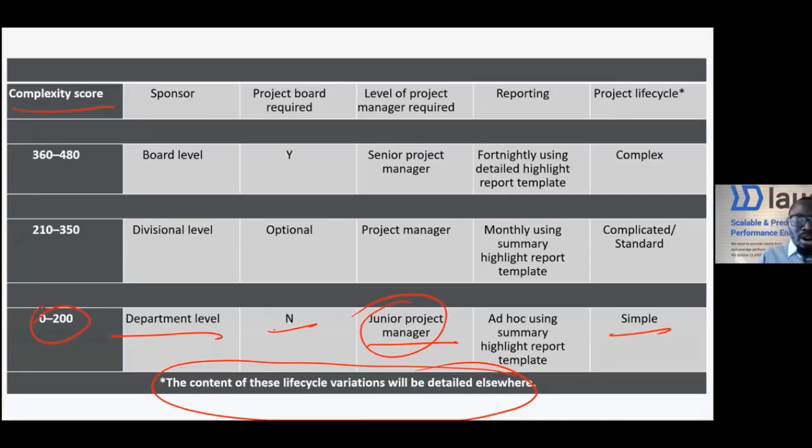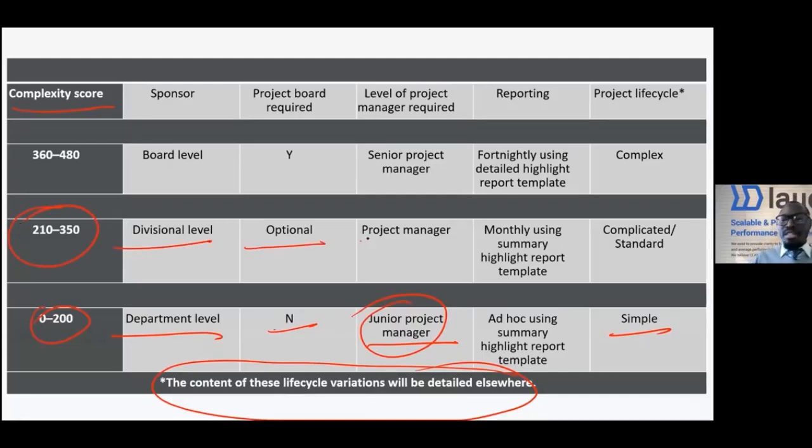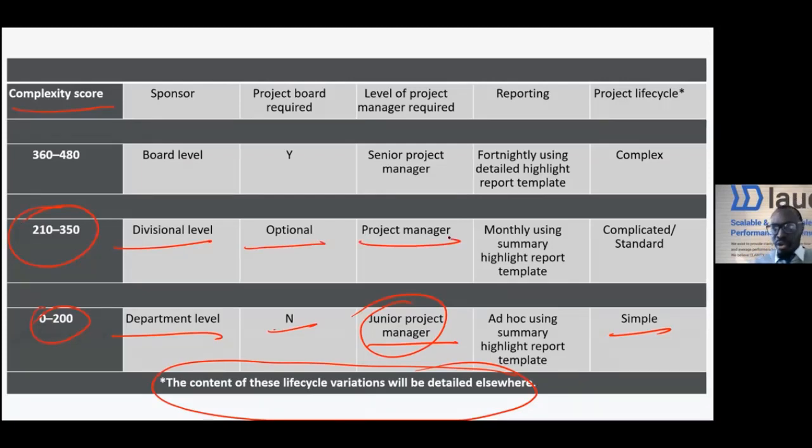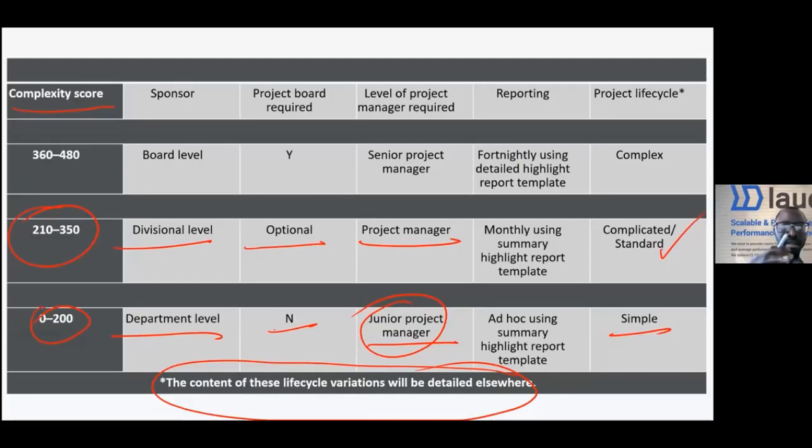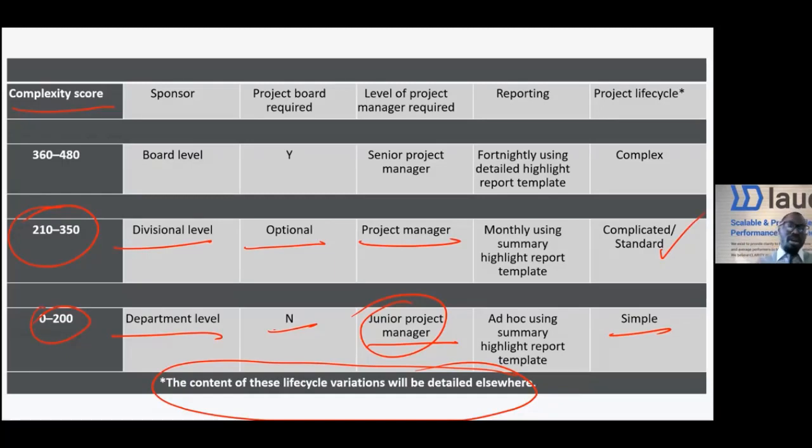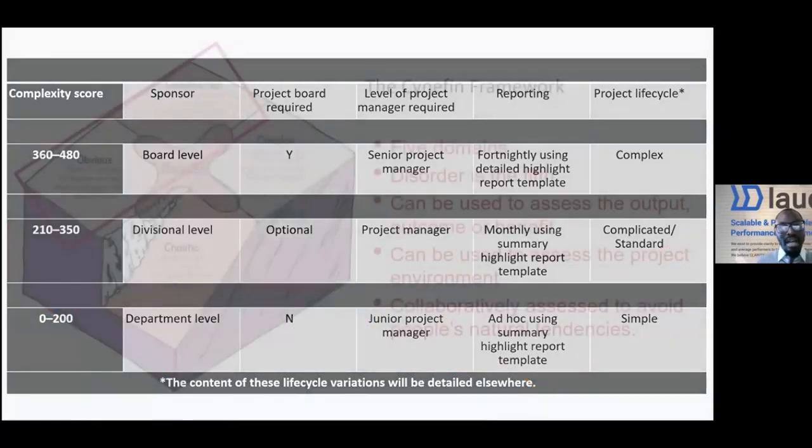But if a project scores 210 to 350, that would be our divisional level. We may require a project steering committee. We need a full project manager, and so on and so forth, because that kind of project is complicated or standard. Organizations normally develop these project complexity modeling frameworks to aid the decision making as to whether a project is simple or not.